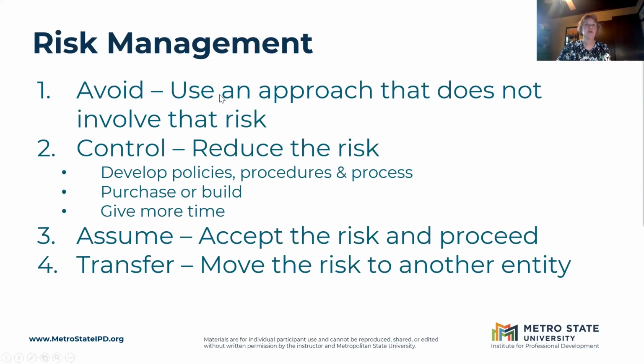So when I move forward with our risk register, when I say avoid, that means we are going to sidestep that risk altogether. We're going to do action up front to handle it right off the top. We're going to take a different path and not even go down the path. So it's a 5, and we want to avoid having it happen.